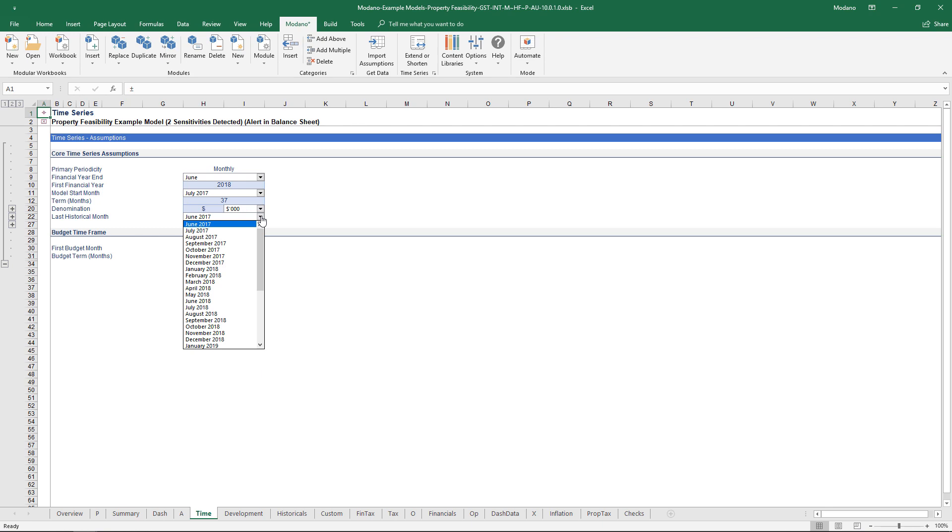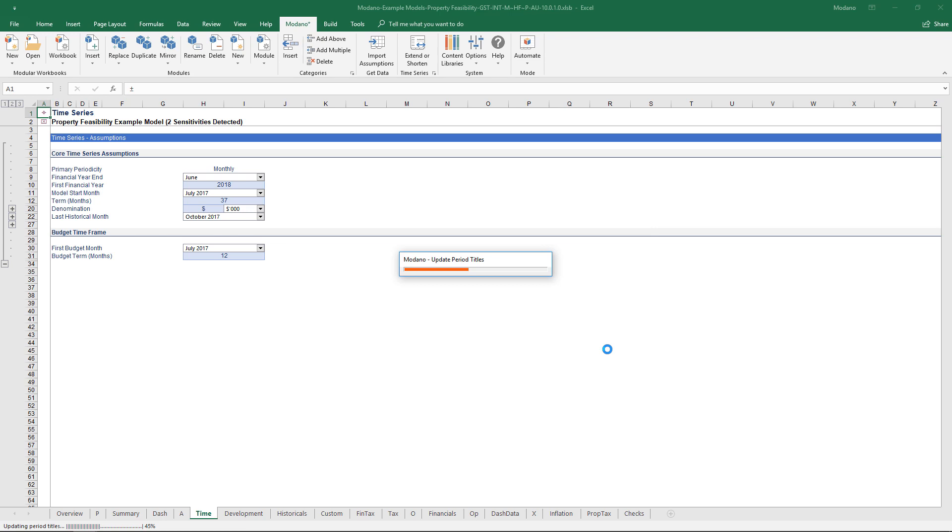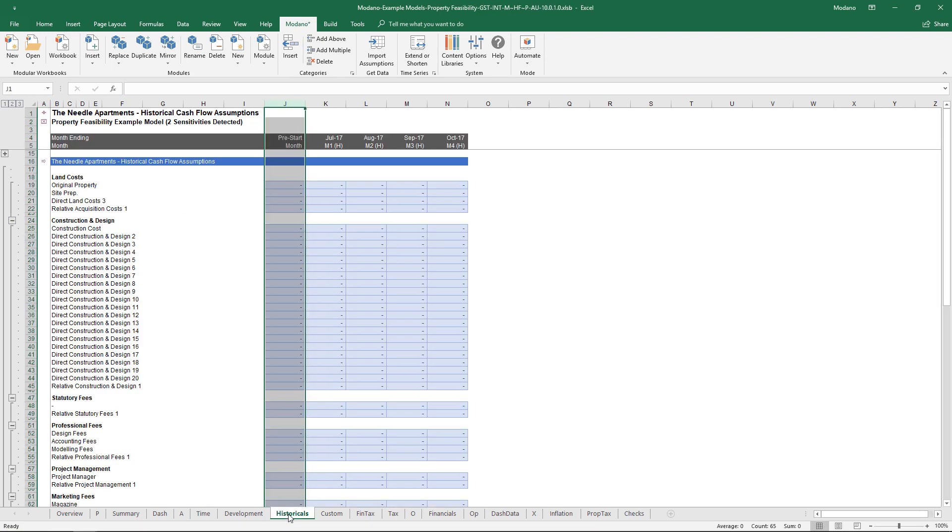At that point what we typically will be doing is heading across to the timing assumptions and updating when is my last historical month. Let's just assume we're kind of four months in. I'll change that last historical month.